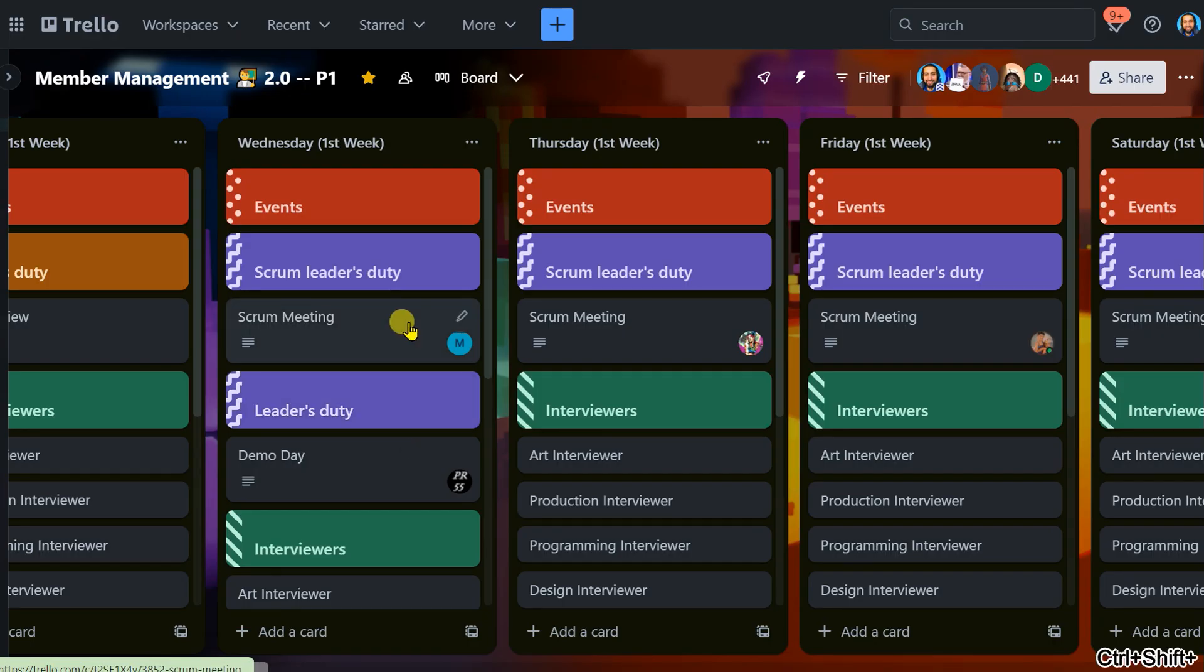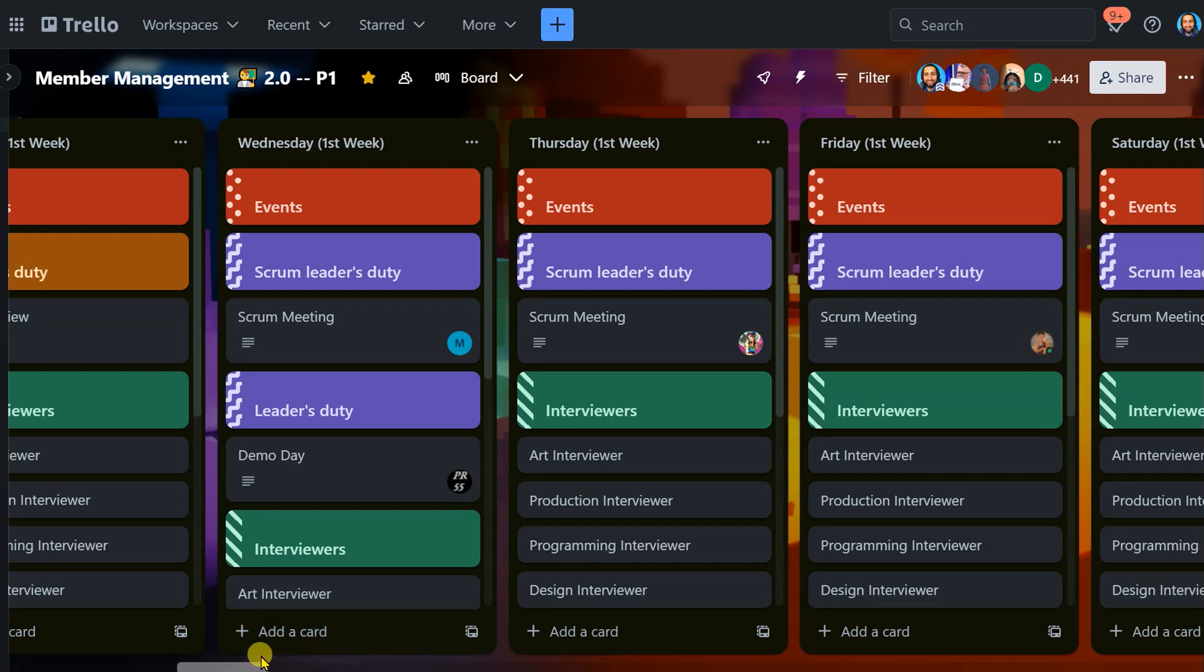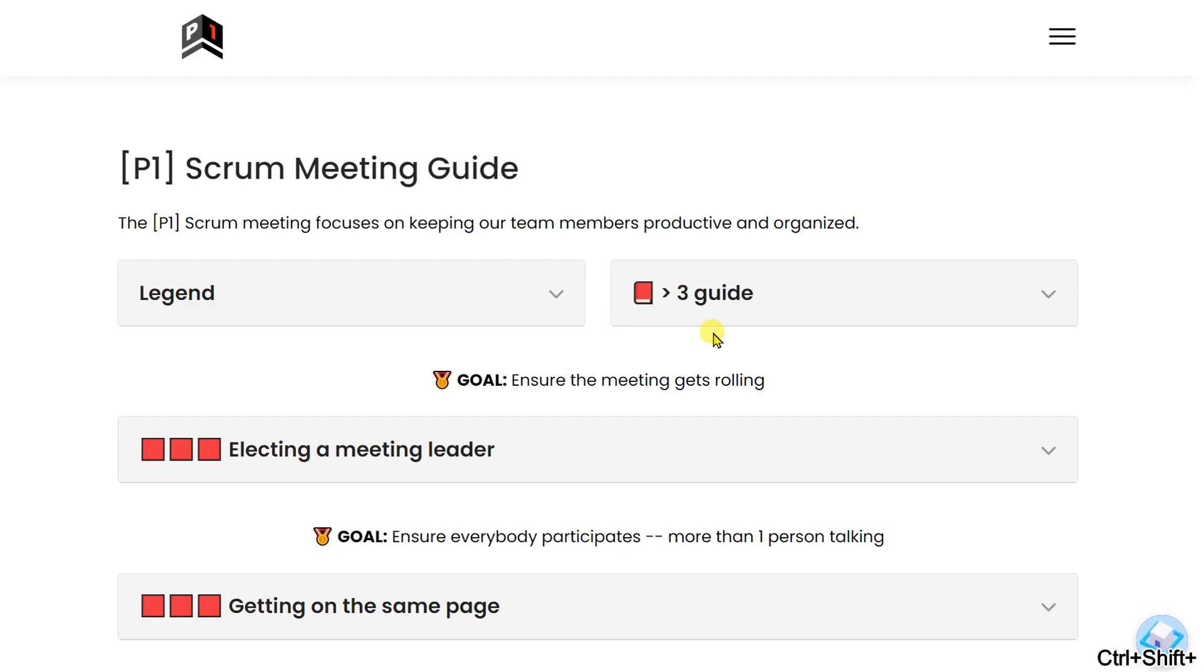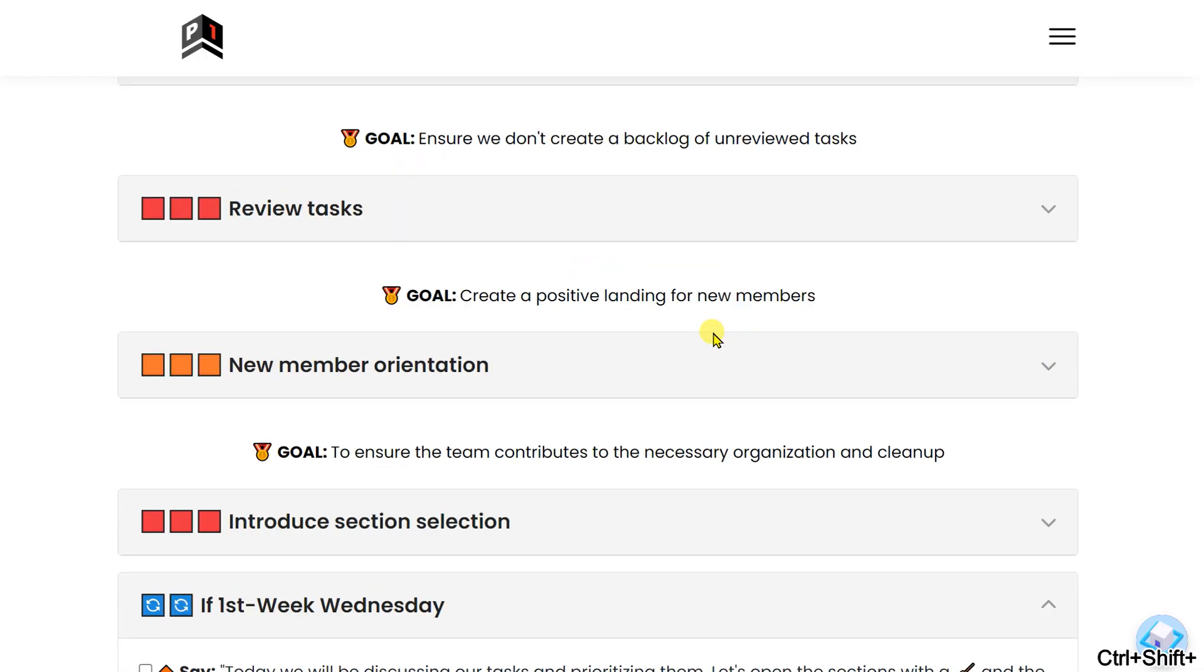Next up, we have our scrum meetings. Our scrum meetings are throughout the week. So they're basically stealing from companies that have three questions. What did you do yesterday? What are you doing today? And is anything blocking you? But they also serve as a time to talk as a team, to integrate new members and to empower them. Here's what we do during those.